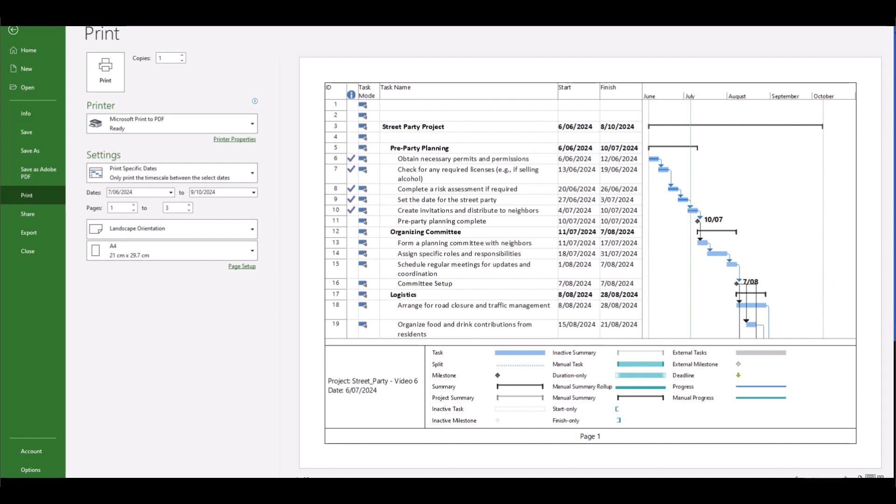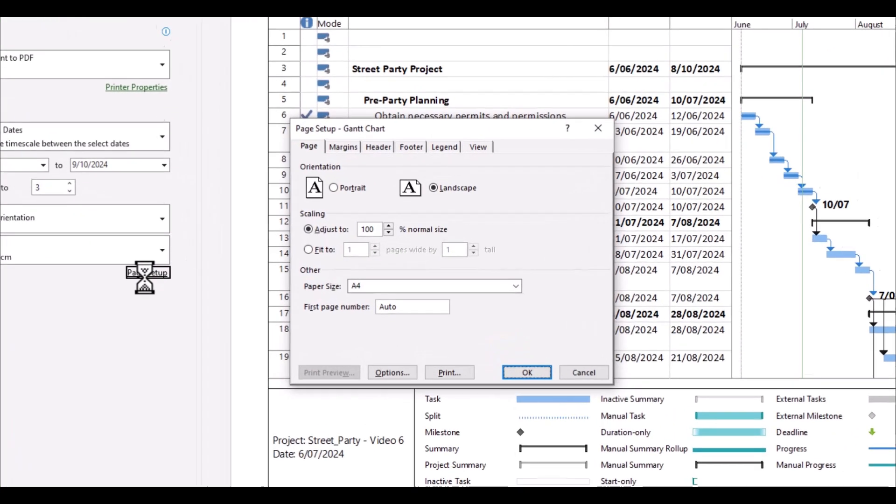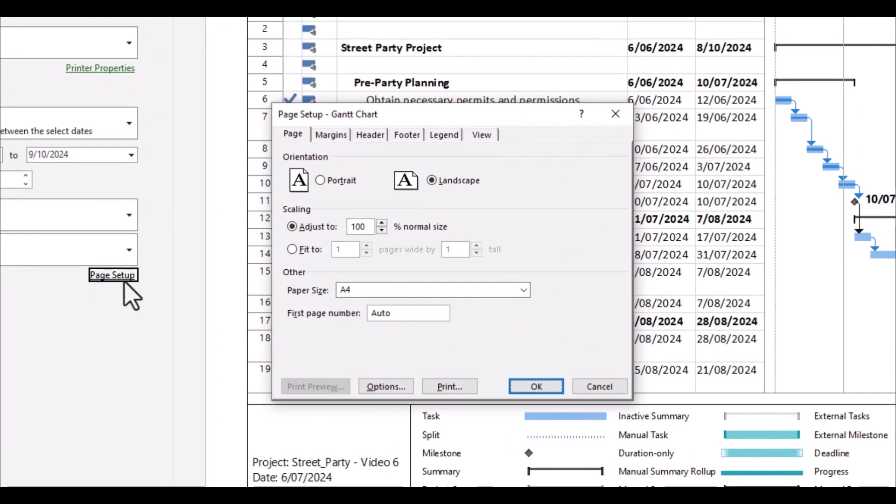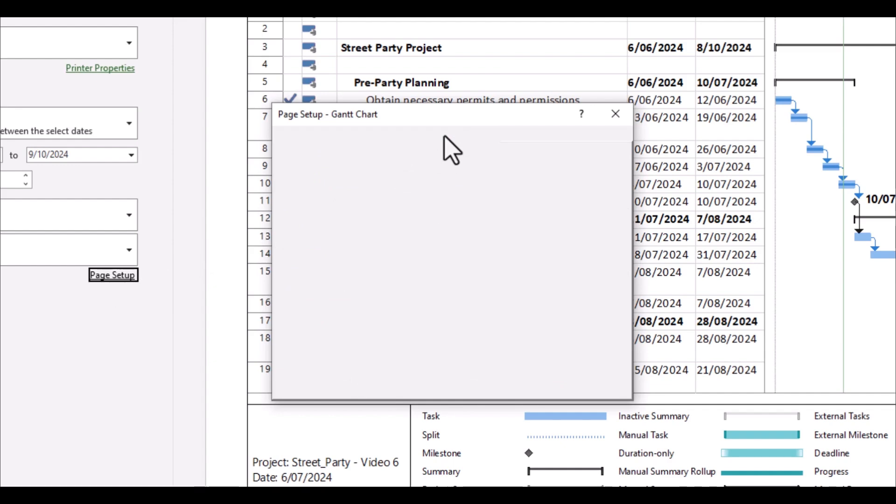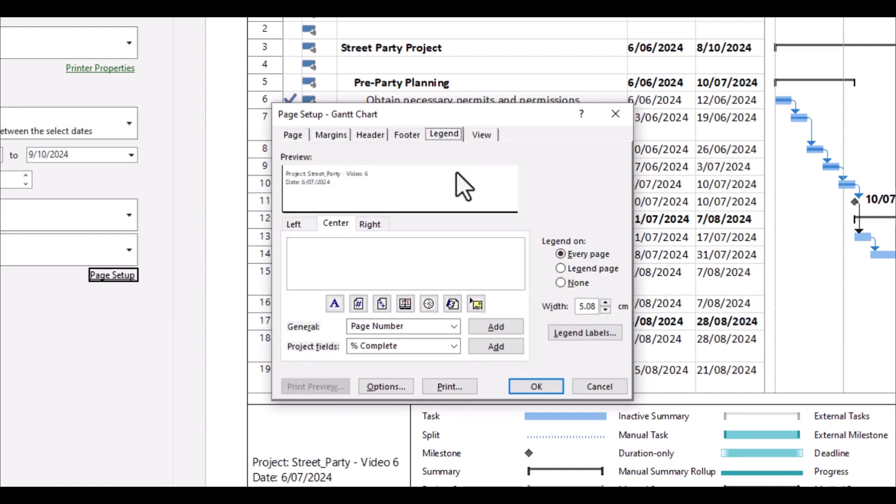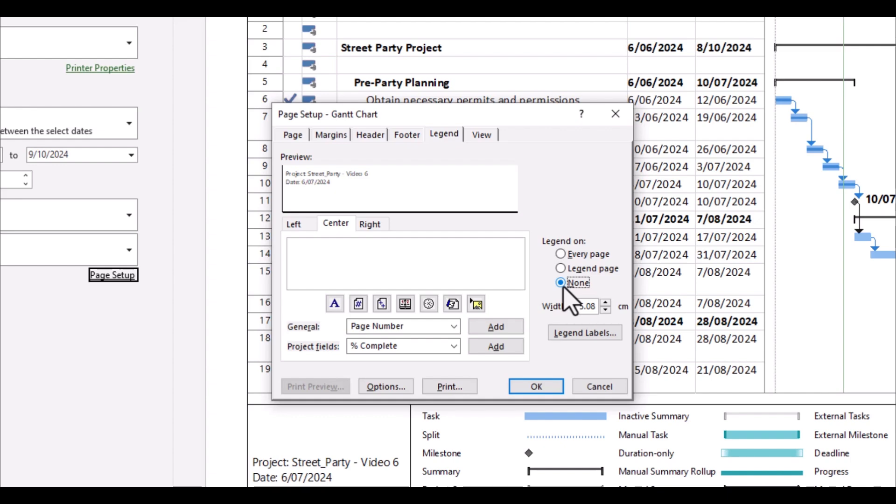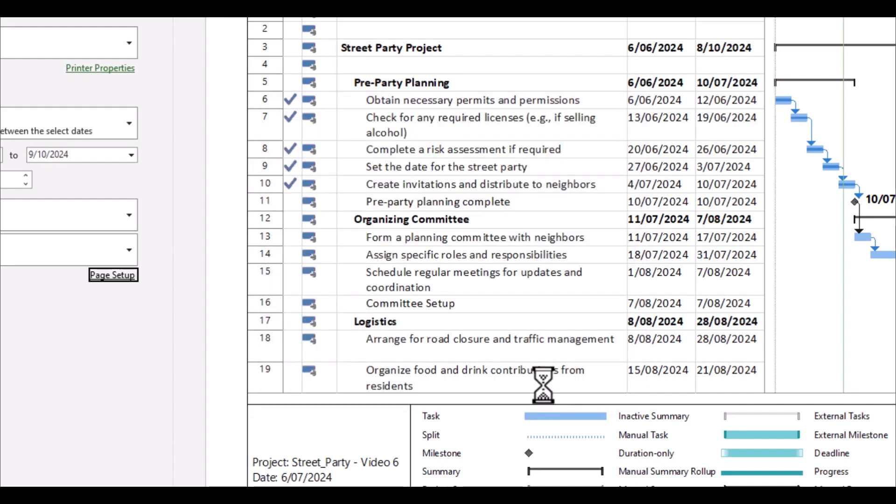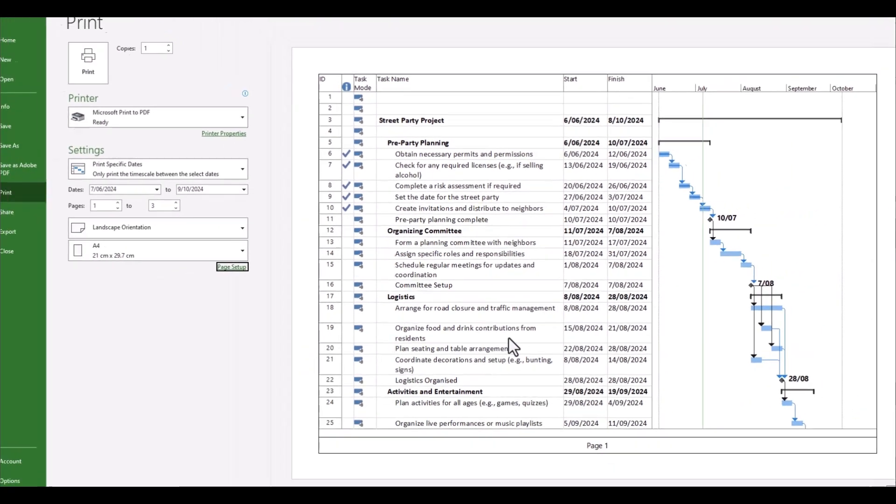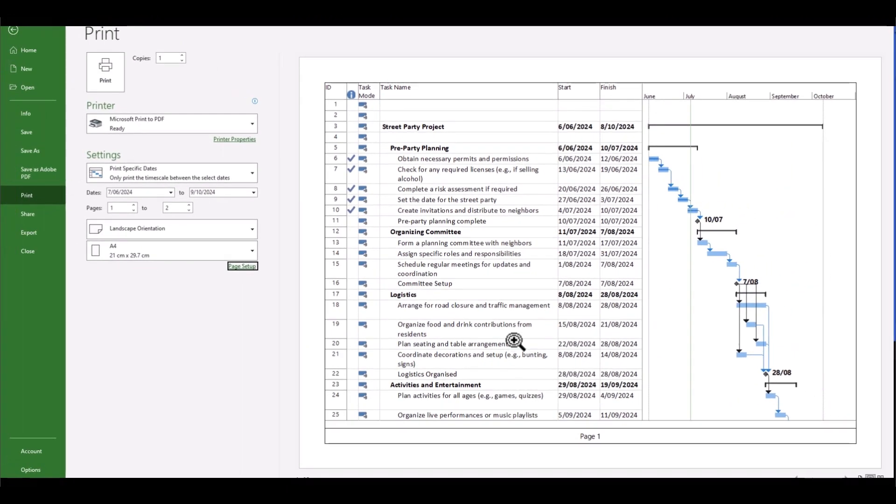Now you'll notice that our legend here takes up a lot of space on this relatively small page. So what can we do about this? Well, let's just jump into page setup and you'll be presented with a little box here, page setup Gantt chart. Let's click on the tab legend and you'll notice here you can have a legend on every page, on a legend page effectively your front page, or none. Now given the fact that we want to utilize an A4 sheet for this particular project, we might elect to go none and we might also feel comfortable with that given that our audience may already be comfortable with the look and feel of Gantt charts. So if we select none, now we're heading in the right direction.